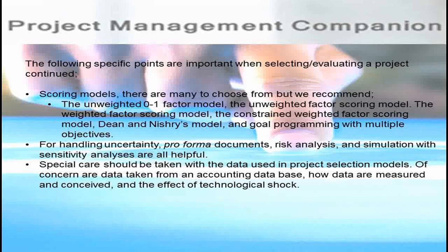Scoring models, there are many to choose from, but we recommend the unweighted 0 to 1 factor model, the unweighted factor scoring model, the weighted factor scoring model, the constrained weighted factor scoring model, Dean and Nauri's model, and goal programming with multiple objectives. For handling uncertainty, pro forma documents, risk analysis, and simulation with sensitivity analyses are all helpful.